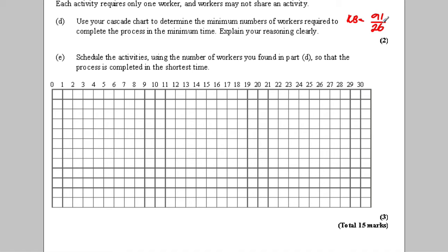Will I get 3.5. So therefore I need at least 4 workers. I couldn't do better than 4 workers. So that just gives me help here to do that.